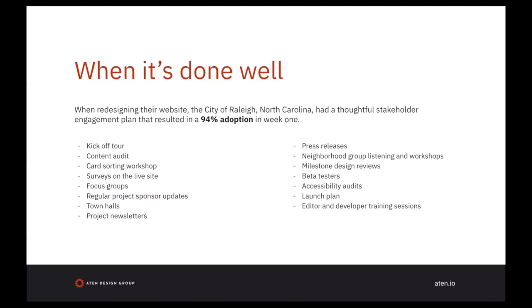So I'll tell you here that we left the old site up intentionally for 4 weeks, as we also launched the new site to make sure that people had enough time to get used to the new experience before sunsetting the old one. But that didn't even matter because we had done such a good job of engaging folks ahead of time and preparing them for this site launch that 94% of users used the new site after 1 week. That's because the site listened to them and it provided innovations that met their needs better than the old one.